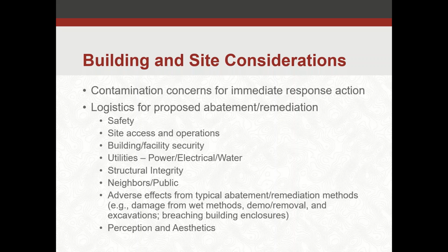Safety is of paramount importance. Can we safely access materials to abate them and remediate them? First off, can you safely access them, investigate them, and then can you get in there and remediate them? Sometimes you have to identify that for the contractors to plan appropriately, so they can install safety measures or bring in appropriate equipment to safeguard against those hazards.